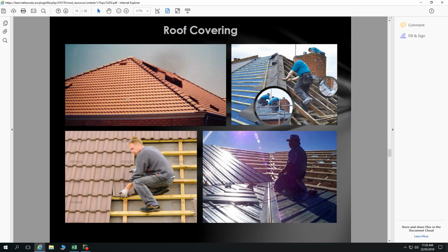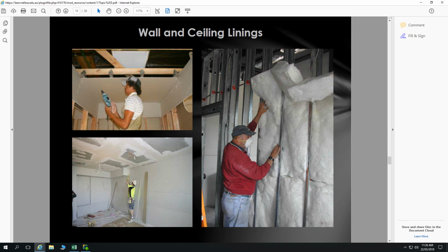So we've got our roof covering happening. So let's say we did our brickwork, then our roof covering. We did it in that way. Essentially, once we keep the rain off, and we've got our brickwork up, so our rain and weather can't come in from the sides, then we can start installing other things like insulation. So obviously we need to get our insulation in before any internal linings go in. Once our internal linings are in, then it's too late.